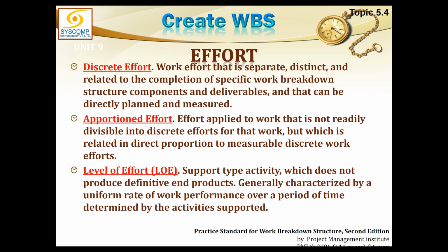Then there is level of effort. Level of effort is also a kind of apportioned effort, but it is not dependent on one single activity. It is dependent on a larger portion of activities, maybe 5 activities, maybe a whole phase or even the whole project. So you might be doing an activity throughout a project life cycle or throughout a phase life cycle. That activity again cannot be measured by itself. It depends upon the completion of that phase or that project. However the project or phase progresses, that is the progress of your level of effort.